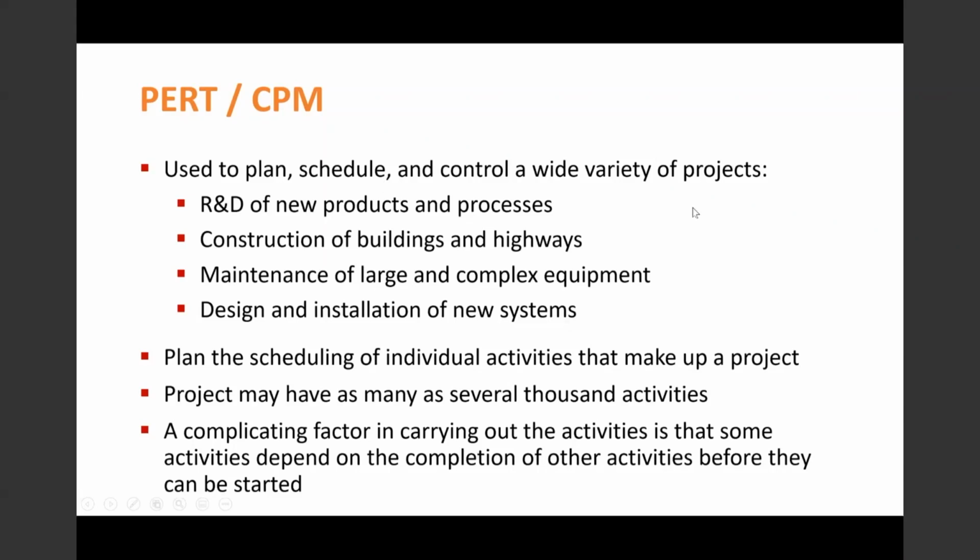In these types of projects, project managers must schedule and coordinate the various activities. Projects may comprise as many as several thousand activities, and a complicating factor in carrying out these tasks is the interdependencies of some of these activities. For example, some activities depend on the completion of other activities before they can be started. Something that I hope you can also remember.